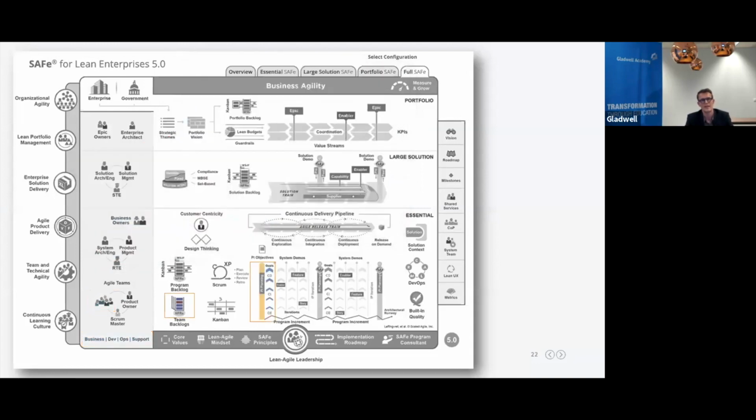So that's about the agile teams. Big change. A smaller change is what we see here after the first PI planning event icon. You see there continuous exploration and continuous integration, continuous deployment as chevrons, the blue chevrons going up. Just to point out that it's very important to have that in every iteration, to do all of that every iteration, and to avoid waterfalling the sprints.